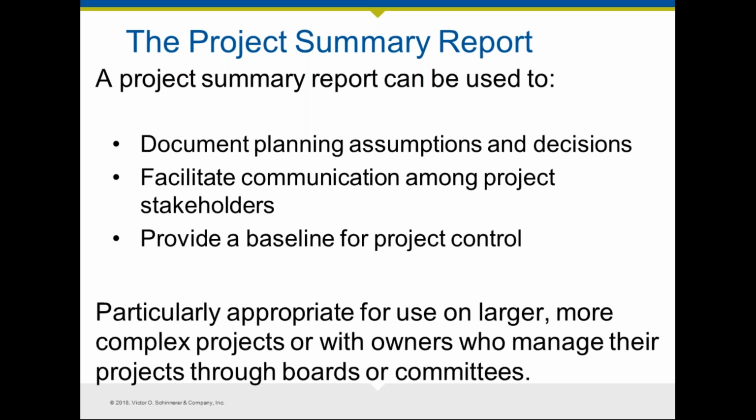Any additional information that has been requested by you that you feel you need during the design phase. Of course, the owner's design criteria and standards need to be clearly stated, the codes and regulations that have been identified that apply to the project, and of course the permitting requirements that govern this particular project. So if you can get that done and you have a project summary report, that is an excellent way to help manage the risk and provide you with a meaningful baseline as you go forward into the design phase.